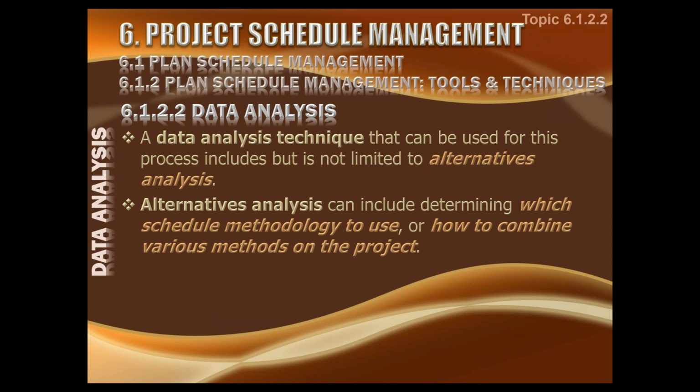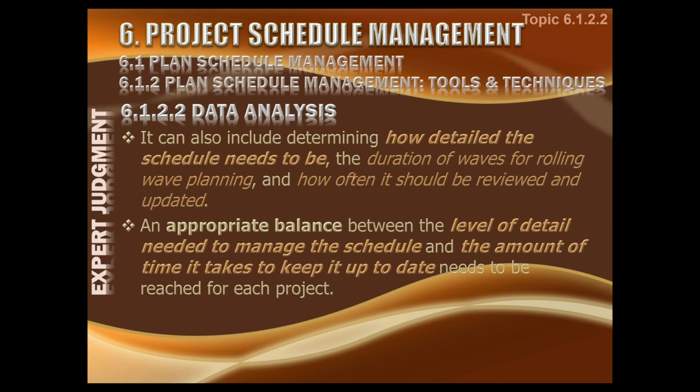Maybe you're using critical path method and you want to have special attention to the resources, or you would like to have the resource balancing and all that. So whatever methodology you want to use, you have to justify that and put it in writing. It can also include determining how detailed the schedule needs to be, the duration of waves of rolling wave planning.